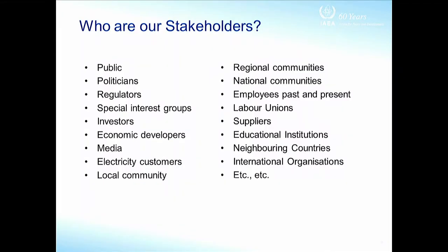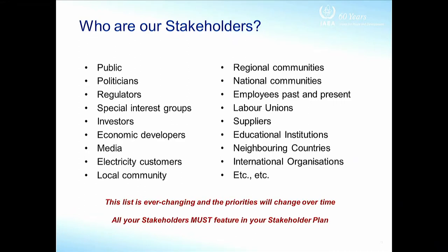International organisations, etc., etc., etc. So anybody who wants to be can be a stakeholder. You don't get to pick. And this list is ever-changing, and the priorities will change, so you need to feature that in a stakeholder plan. You need to run a really live stakeholder plan with experts to do this.